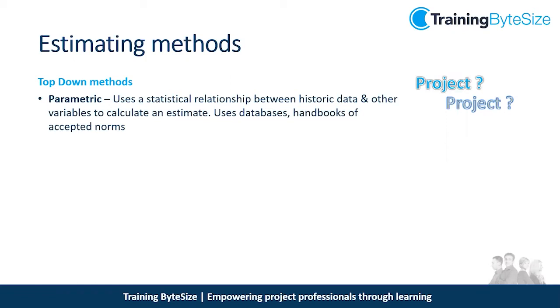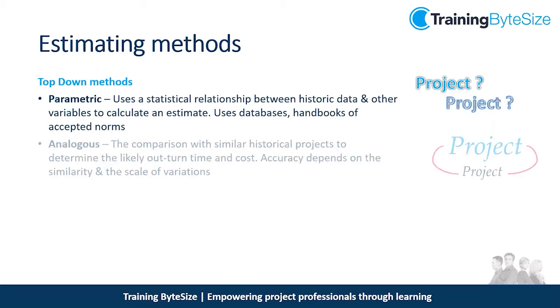And he's done that because he's got a database of evidence allowing him to establish how much his time is worth, how much materials cost, how much he can do in a day. He then uses this database and generates an estimate using a formula from the data, evidence, experiences established in his database. So it uses databases to then extract a quote. So if you've ever had building work done for you, builders come in and measured around your house and said, oh, big job, this is going to cost £1,000. They've done a parametric estimate, okay?